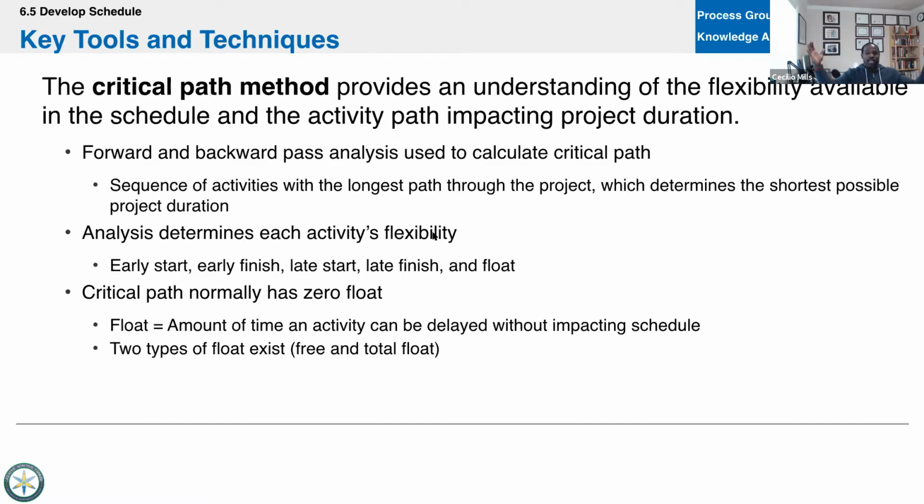If we keep the schedule here, we say the schedule has the delivery date here, but we know that if we use all of our buffer, it would end out here. But as of right now, this is what we're tracking to, and we know that we have reserve to use, then that's contingency. So that's the difference between the two. If you have an end date here, but then you have this piece here, they call that reserve for the total thing. But if your total project includes it and it's within each of the activities, then that's padding or buffer. And there's no right or wrong way from PMI. They're going to be very specific about those terms, because you can use them all in different ways.